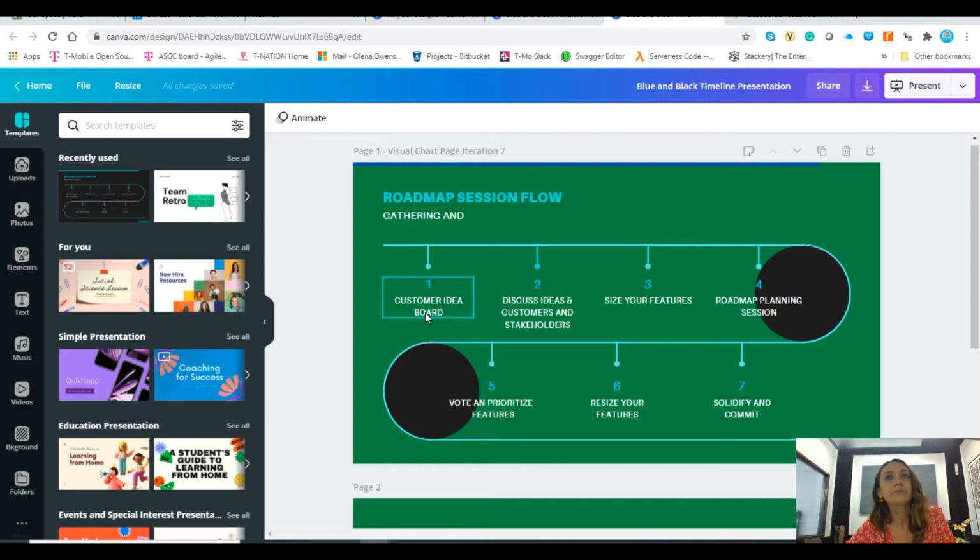So going back to the story points, now we have 600 points for the entire quarter. We have our top 6 or top 10 features. We've t-shirt sized them, and looks like we can deliver only 4 features based on their t-shirt size.